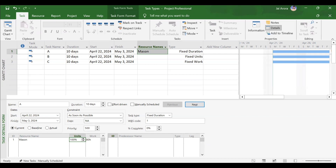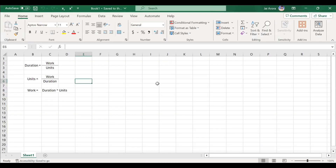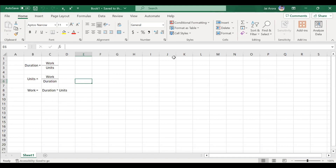Three formulas — really the same formula in different forms: Work = Duration × Units. Duration = Work ÷ Units. Units = Work ÷ Duration. These three formulas will be used throughout these videos, so take a snapshot for reference.